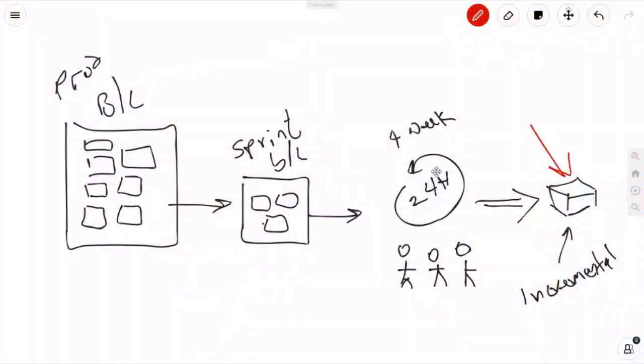Well, it enables us to get to market quick with a first iteration or a first round of the deliverable, get some feedback from the marketplace, understand what value is in the perspective of the customer, and in iteration 2, when you do this again, you're going to add some additional functionality that may be more valuable, maybe even beyond what you had in there at first. So this is very adaptive.